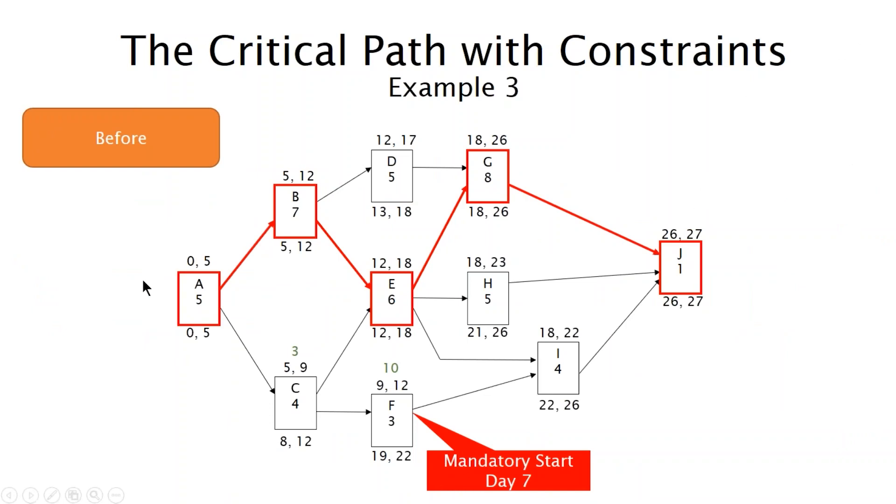Third example. Mandatory start day 7. So this activity is currently starting on day 9, has 10 days afloat, and I'm saying mandatory to start this activity on day 7. Hard constraint. Let's see what happens. We've broken this relationship as a result of applying that constraint. Whereas day 9 here, the finish of C was driving the start of F, but no longer. In fact, these two activities are now overlapping, and there is no total float for this activity. Total float has gone to zero. So this activity would show up, even though it's not in the path of the critical path, but it would show up as a critical activity.